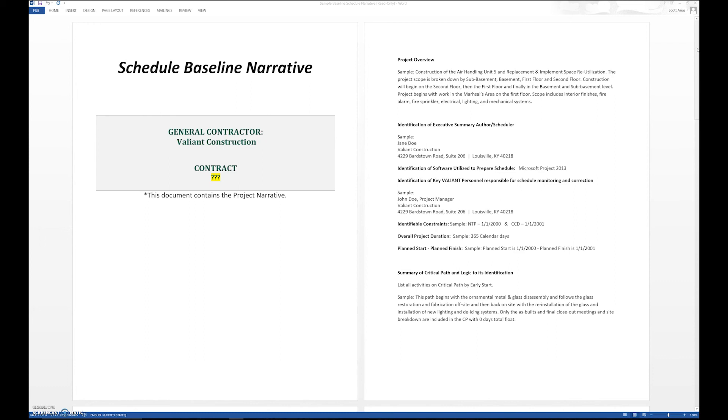A narrative is very important for the baseline. Of course, we'll have a narrative associated with the updates, which we'll do at a later time, but we're just talking about the baseline schedule here. The schedule update narrative is a little bit different—it talks about changes occurring, negative float that has occurred—but this is just focusing on the baseline schedule itself. That pretty much covers the narrative portion of the schedule.